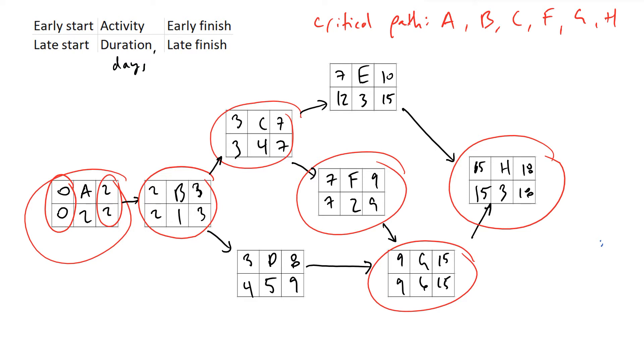And so now what we're going to do is define this term called float. Float is equivalent to your late finish minus your early finish. And it's also equivalent to your late start minus your early start.